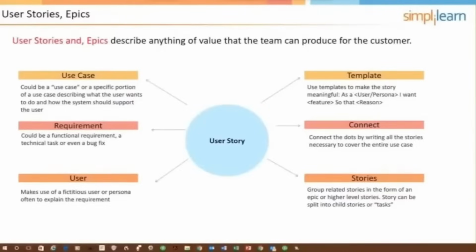That's done in the sprint planning meeting, and then those tasks are the things that are actually done when the work of the sprint begins. User stories can be estimated in story points or ideal days. Most teams favor story points. They might start with ideal days, but they will usually end up going to story points. Tasks are estimated in ideal time, which is usually hours.